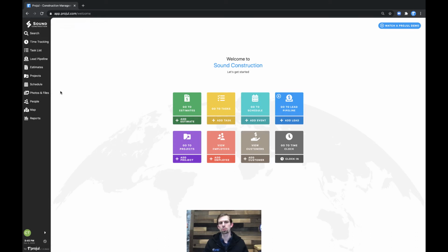Now, before we go over to the Projects page, I quickly want to mention that the Projects schedule is a view of our scheduling feature. There's the Projects page, the Schedule page, and the Task page, all three of which are linked together. If you make a change in the project schedule, the Task page and the Schedule page will be updated respectively, and so on and so forth throughout all of those views. They're essentially just three different ways of looking at the same exact information.